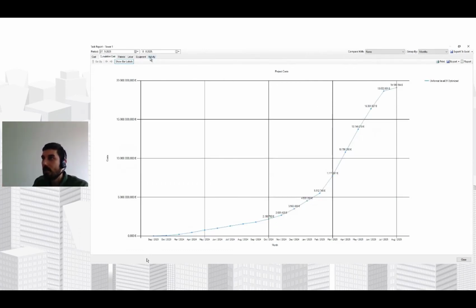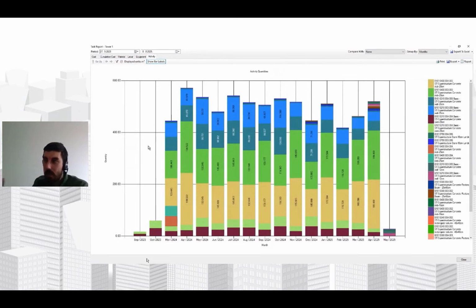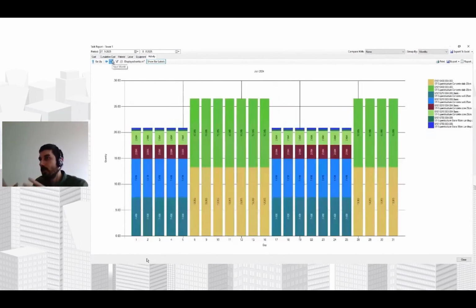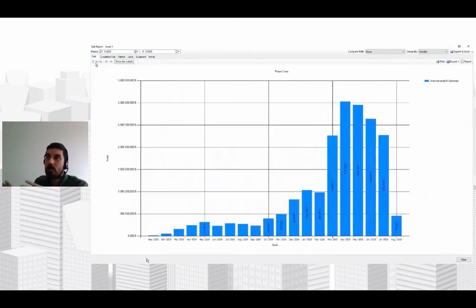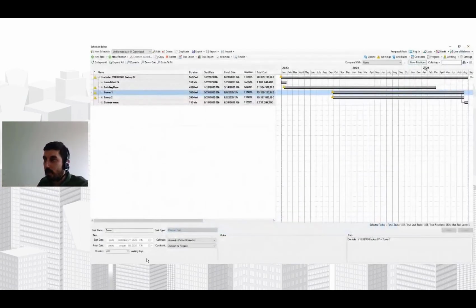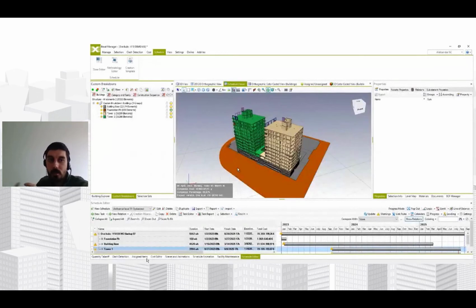So basically, these statistics are checking points for the planner, where you just get the schedule structure, you just check the cash flow, you check the cumulative cost, you check the activities, you can check resources, and then change and optimize durations and fine-tune relationships so that you can achieve the best possible results with your schedules in the future.